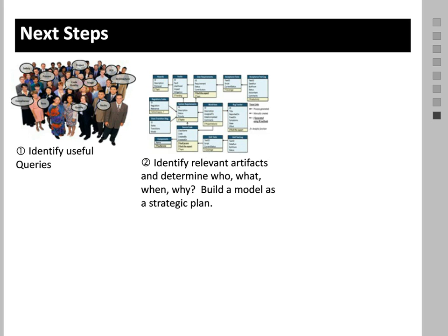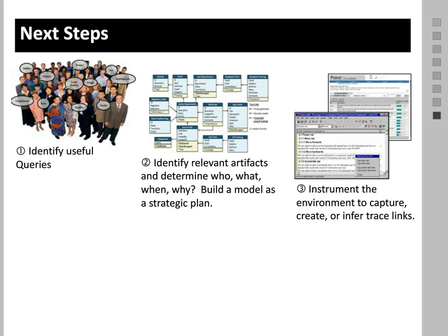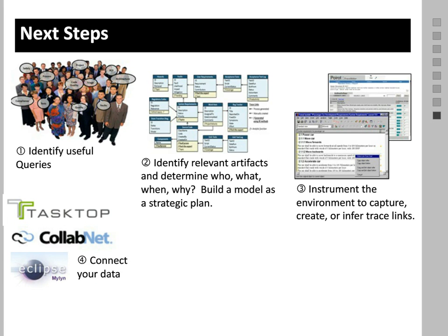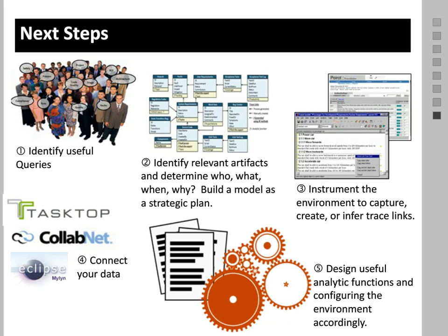You need to decide, based on your questions, how you're actually going to collect the data that you need and when you're going to establish traceability links between them. Instrument the environment accordingly. Connect your data. As previously mentioned, there's a variety of ways to do this. You can maybe just connect your data because you're using an integrated development environment, in which case your data is going to be connected to start with, or you can use some external tool or service or build that infrastructure yourself. And then finally, design useful analytical functions that you can integrate into the queries that you want to ask.